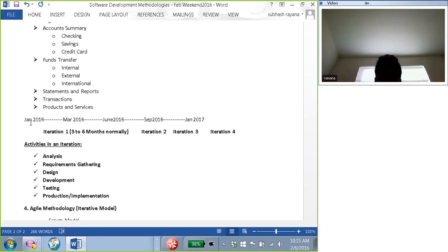Once it is delivered, then we may have change request enhancements coming in, and depending on the type of change, we can quickly analyze all the changes and implement them using an agile approach also. So once the project is complete, you can also move from the waterfall model to agile. That is also a possibility, depending on the process and depending on what exactly is required.